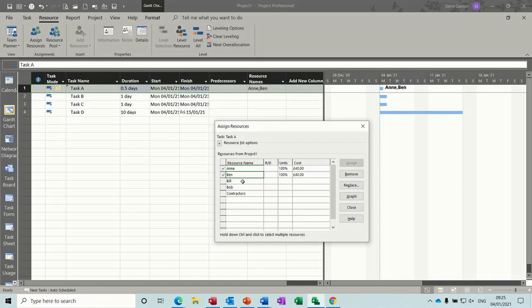So in real terms, you might have a task that you think one person can do and she may well have done a few days on a task and then needs help. So to get that task done in a time frame, because maybe she's delayed or he's delayed or whatever, then you would put the tick on, assign extra people, and it would bring the timeline back in and then carry on from there. So the tick is not necessarily going to be on at the beginning, or you could do that, but you need to be aware of it, and anybody using Microsoft Project needs to be aware of what that tick does.